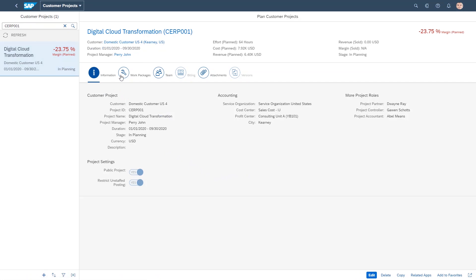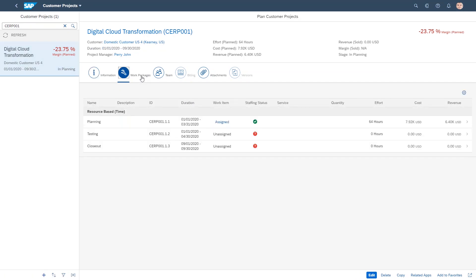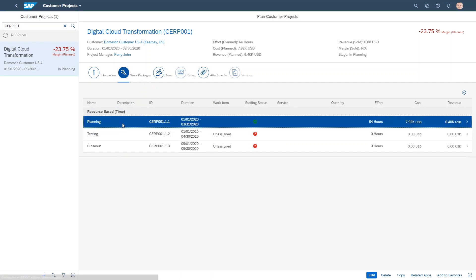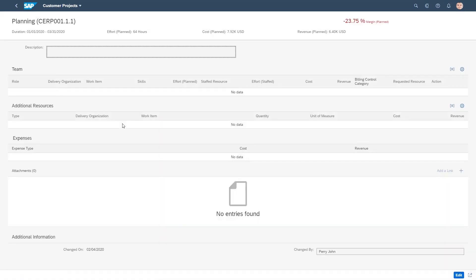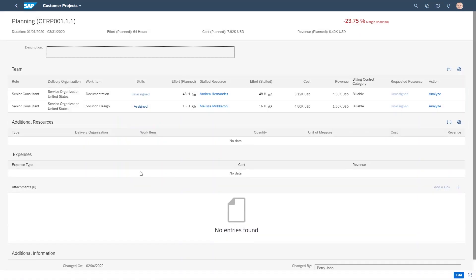Let's have a look at which work packages are causing the problem. Only planning has been assigned so far, so let's drill down there. We see two people have been staffed, and clearly Melissa costs far more than the revenue she can generate.